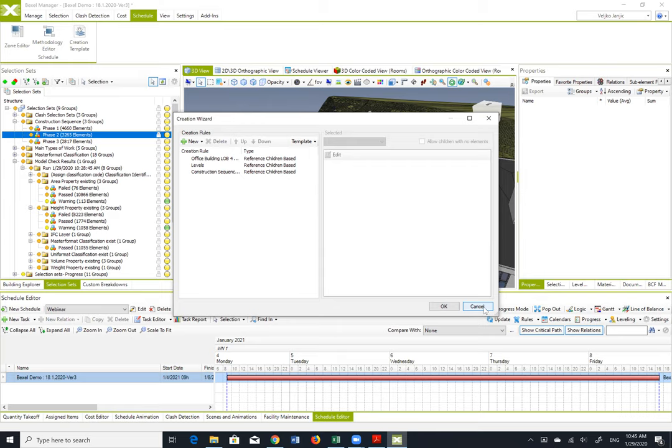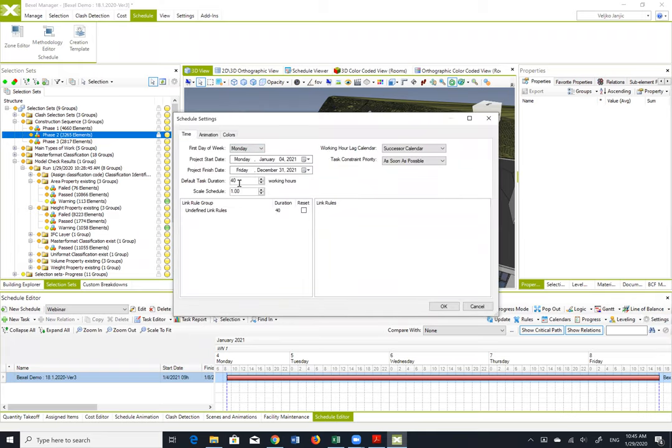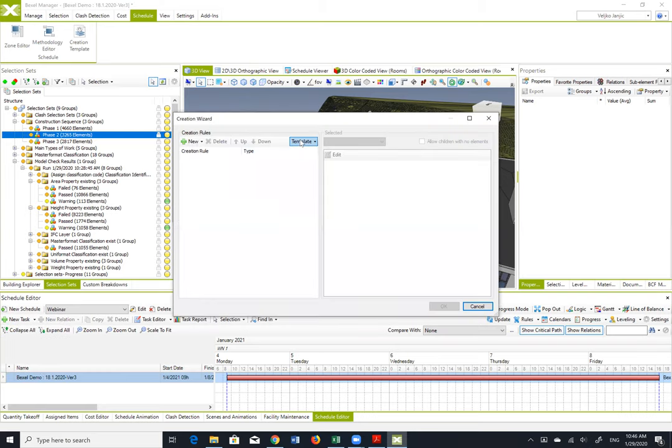What I just forgot to mention before this wizard is that in the settings, you can define the standard task duration, because we strongly believe that working in cycles is very important. In this case, the standard predefined is 40 working hours, but it could be any number you define. You can choose which calendar you would like to have. Could be a standard calendar or 24/7, all around the clock schedule. And you can also define a task constraint priority. Could be as soon as possible, but could be as late as possible as well. So there are two different strategies in construction scheduling. So when I have this defined, I'm going to just again load this